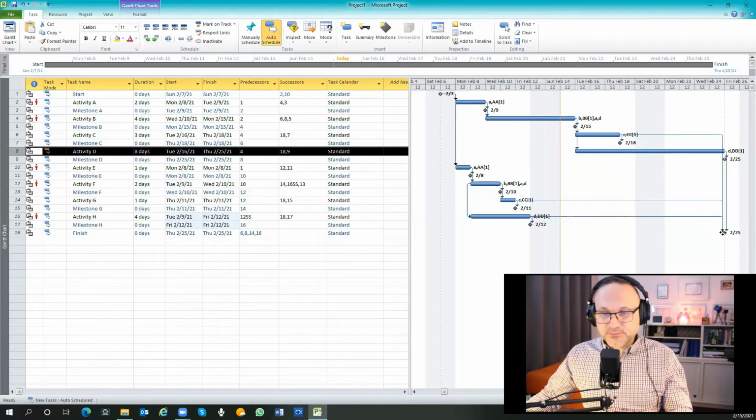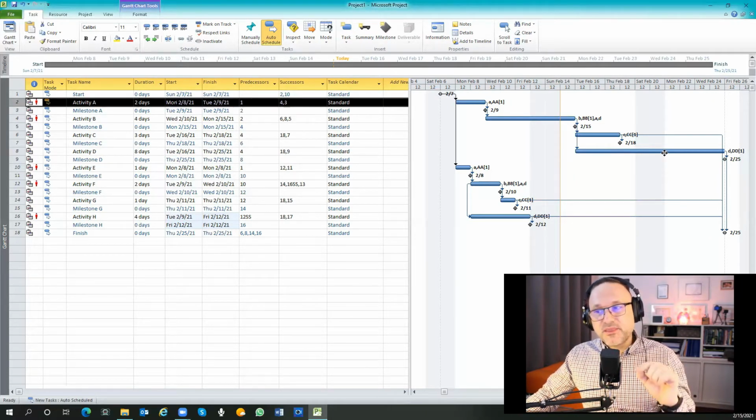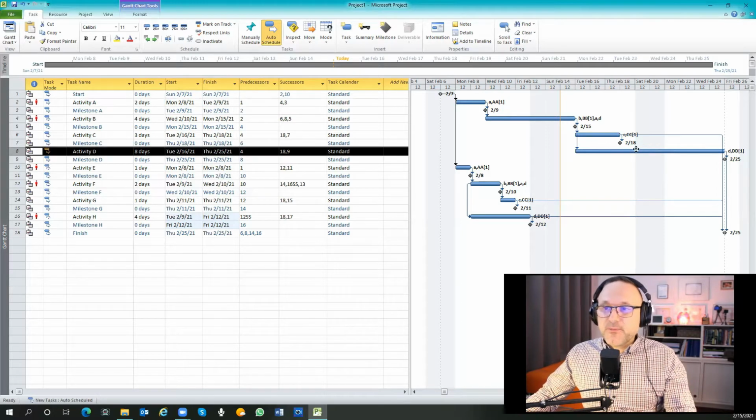project delay. Okay, that means when I want to crash and reduce the project, I have to crash those activities which are in the critical path. How can I crash it? I can crash it by adding more resources to do the work earlier. So if I consider that I have 8 days now and I need to reduce it, I can add more resources to crash this activity.